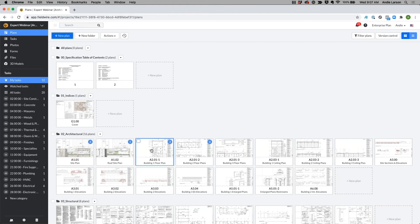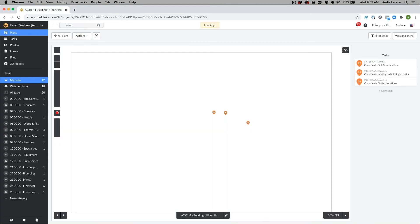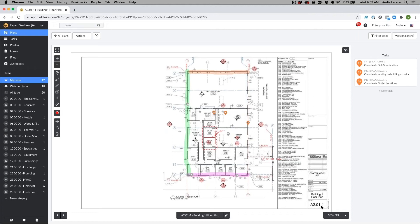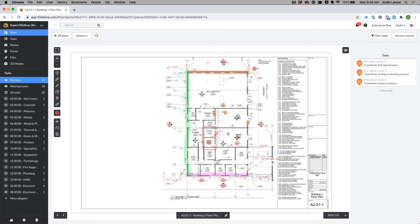When you upload your plans, Fieldwire will scan the plan and look for the sheet number. In this case, the sheet number is A201-1 and what it's going to do with this information is one, name the drawing, two, it's going to scan the rest of the drawing looking for any callouts, sections, elevations, and details, and it'll automatically hyperlink those sheets to your callouts and elevations.